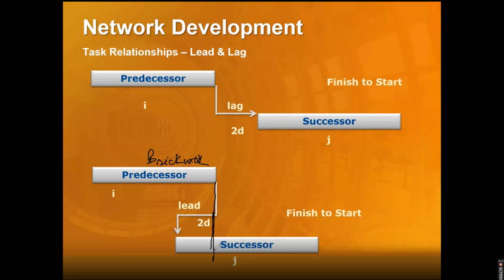So this is roughly 2 days of prep work, getting the raw material on the site and getting all the labors in. So that was probably 2 days of prep work, which I would have started here. I'm doing this extra work because I have to wait for the brickwork to get over. So everything else which can be done early, I have done preponed. Now I will only take 3 more days to complete the job here.